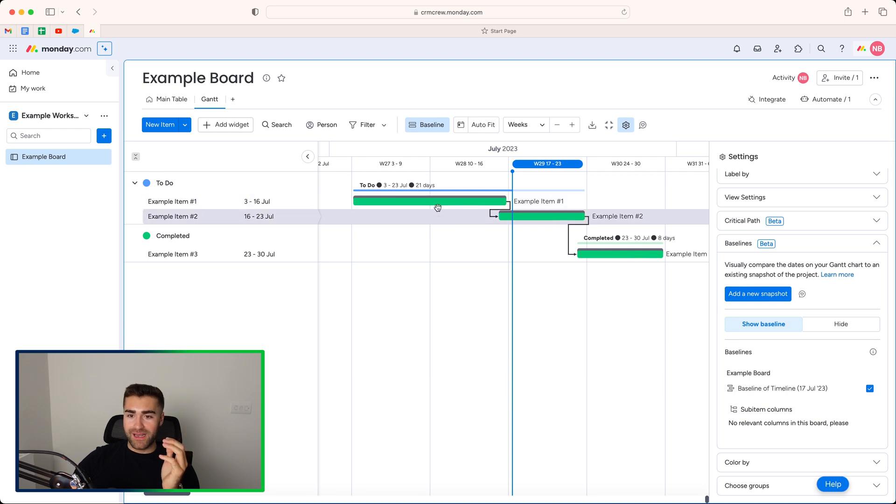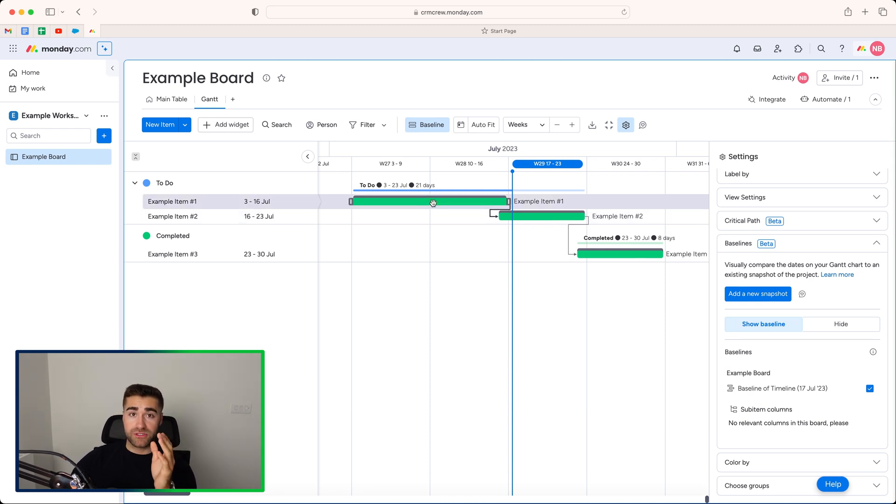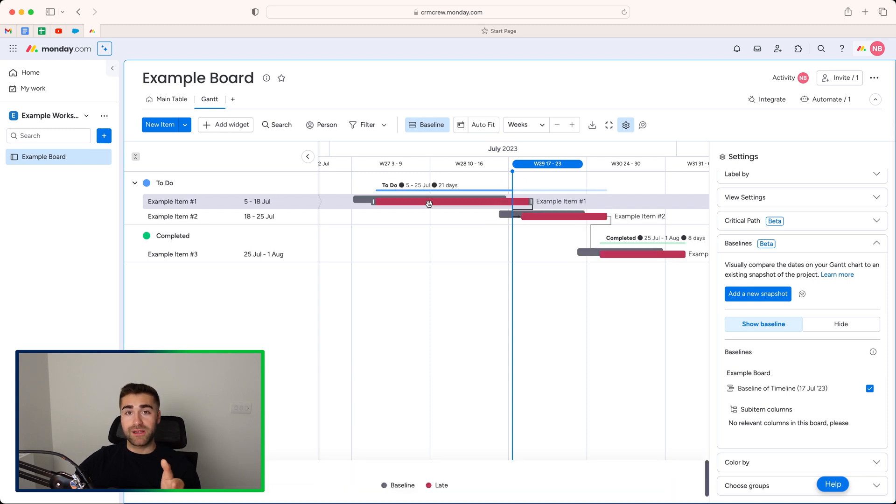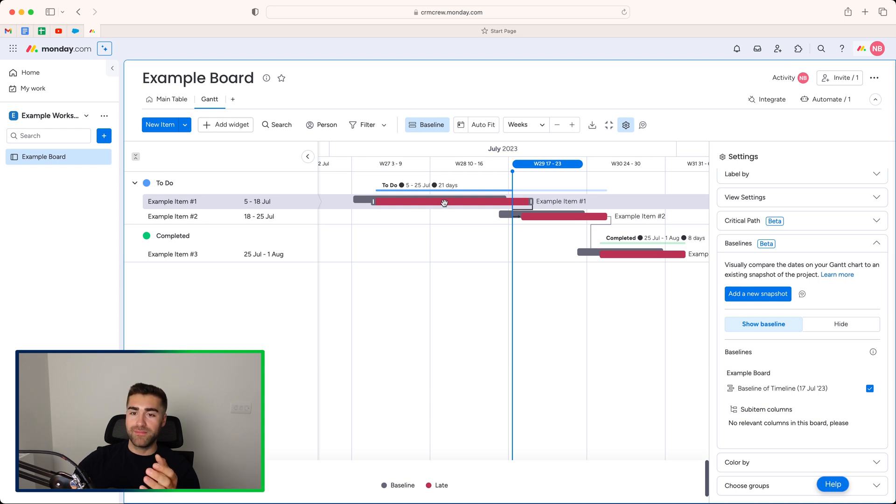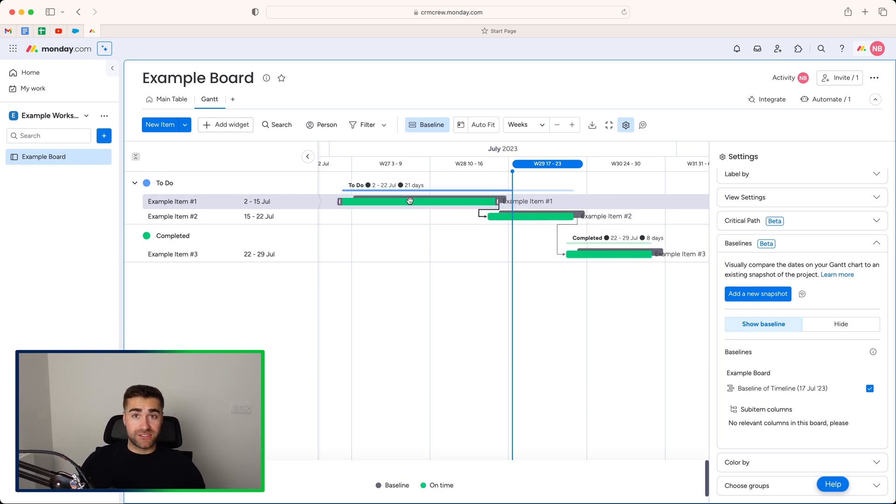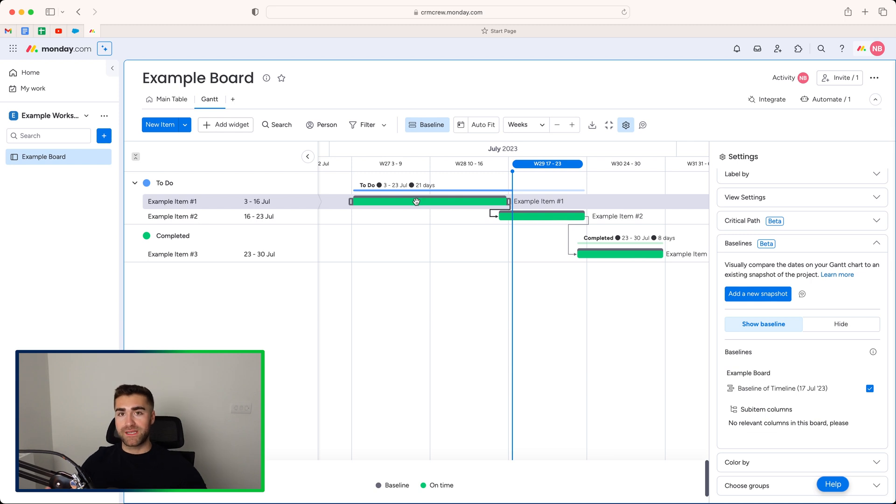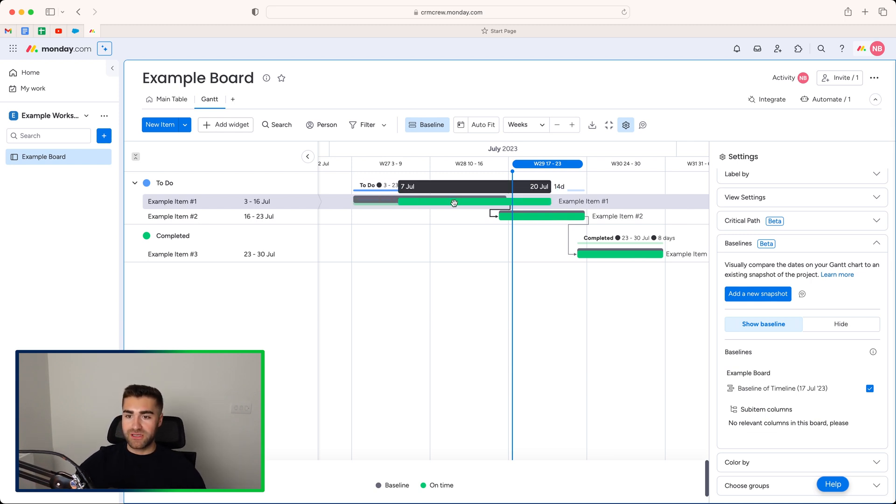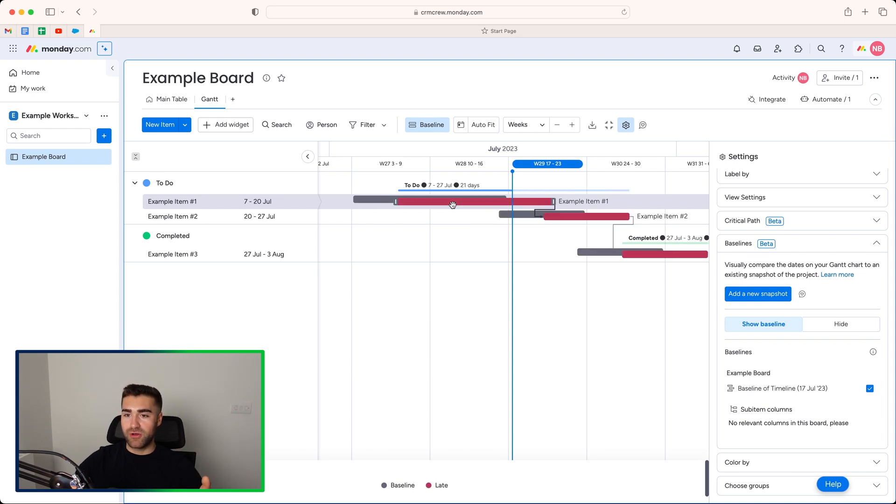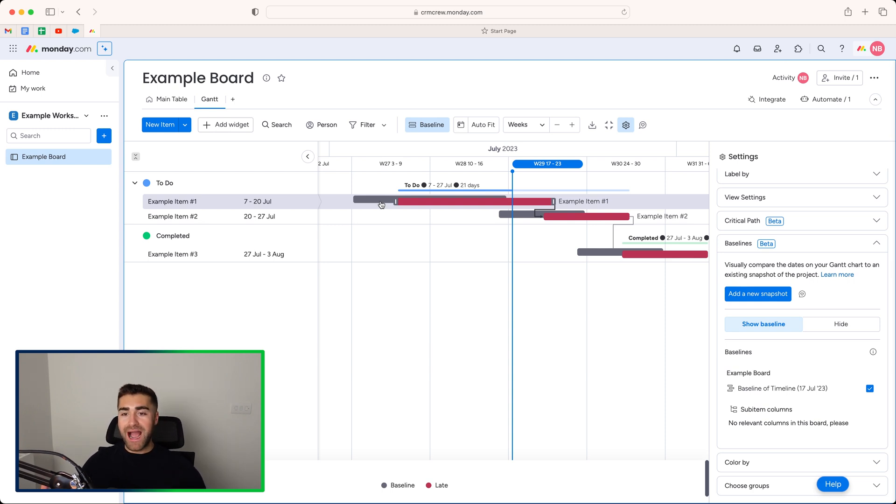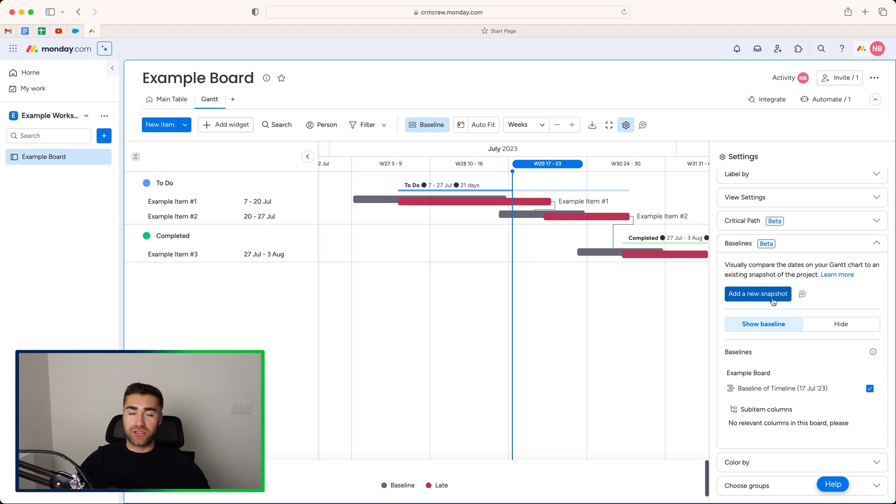And if we then go ahead and adjust the example items or just one of them, change the date, you can see that that will adjust accordingly, but now go into red. But we can see our baseline. So we can see how far off we are. If we then move the project back or to suggest that we're early in completing the project, it will remain green if we are still on baseline. So within the dates that the snapshot was taken, it will remain green. But as soon as we start adjusting to make the project completion later than when the snapshot was, you can see here that it changes the color to red. But what I really like is you can see when it originally started, so when the plan was and what the actual is as well.